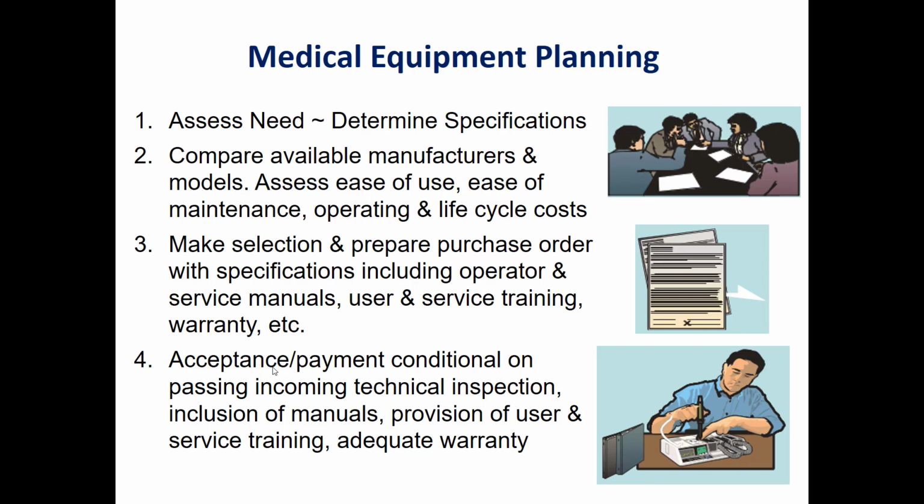Finally, we make the incoming inspection, and based on the acceptance of the result of this test, we make a conditional payment to the vendor or manufacturer. So this is the first policy we need in the planning phase, in case we need to procure a medical device and deploy it in our hospital.